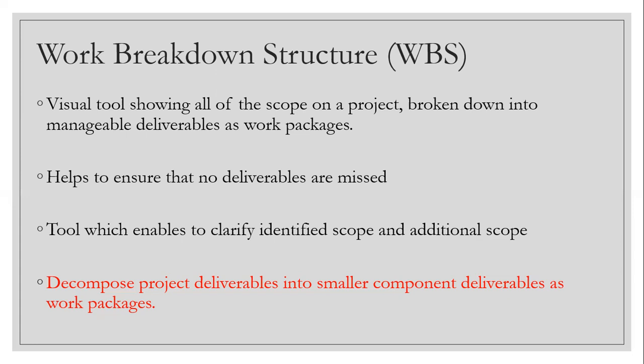On day three, the project team spends time on the cost and the budget, looking at the schedule. When all three baselines are done in the three days, the remaining two days they spend on risk: known unknowns, unknown unknowns, and surprises which might be a risk in the program. And that's how the workshop is over. At the end of the workshop, the project manager is expected to document all this and then get a sign-off from the client company. Okay, that's how it is done.